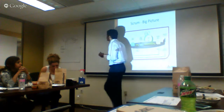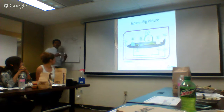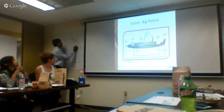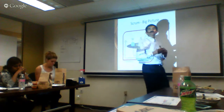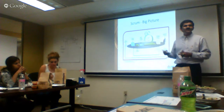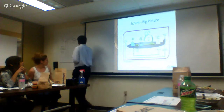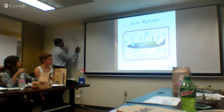And then, what happens next? The next day, the sprint begins. They start working on it. They huddle together. The team works together and they meet every day in the morning to discuss where they are on the commitment they gave earlier in the sprint planning meeting. That's called the daily Scrum. It's a 15 minute meeting.